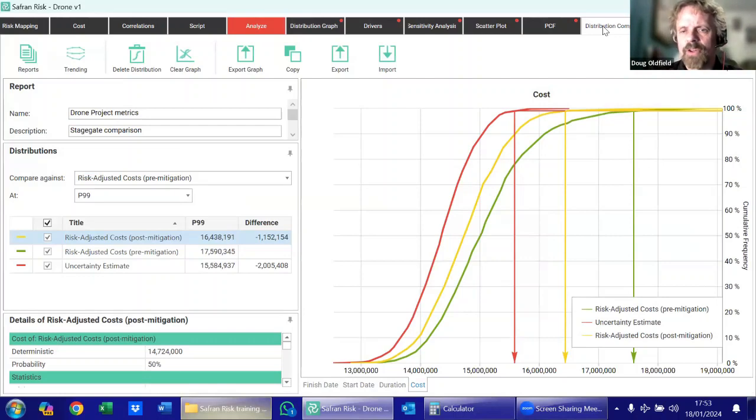And of course, when we're talking about scenario Monte Carlo, a lot of it's not just a static process. Often we're looking to understand what would happen if we do things differently. If we go down this contracting route rather than single sourcing, if we put out these work packages rather than this, if we do these activities rather than these ones, what does that do to our outcomes? If we control these risks, if we put some money on mitigation or controls, how does that help us? So a lot of the process in Monte Carlo is not just about coming up with a P90 or P80 or whatever it might be.